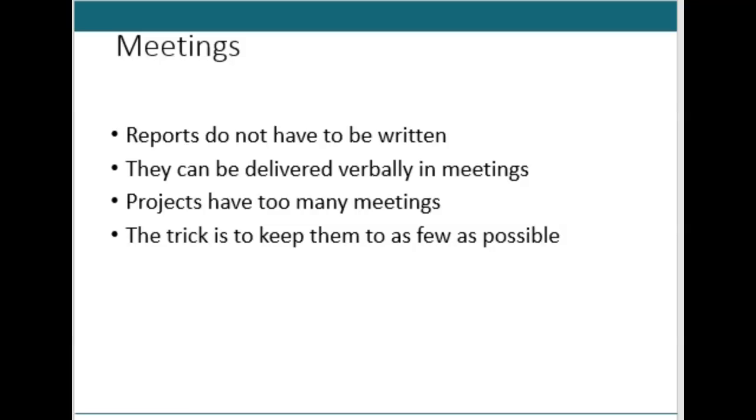Have a timed agenda. Have a separate person who's a facilitator that monitors the time. When you go around the room at the end, don't let people talk on and on. Give them a 5-minute time limit or less. If there are new issues brought to the table that are outside the agenda, I would ask them to put it in an email afterwards, unless it's critical, unless it's urgent, right now, crisis and chaos devolving the project. I would say now is not the time. We'll consider that at the next meeting.